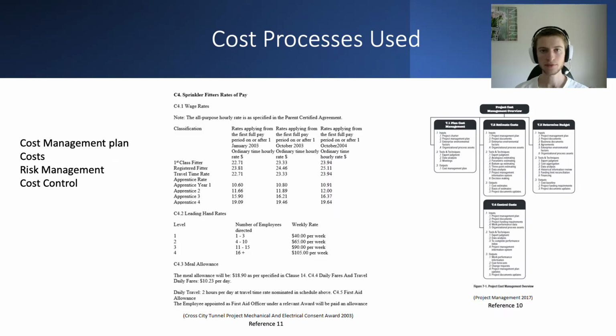The project had a cost management plan based on the work breakdown structure. This allowed direct costs, direct project overhead costs, and general administrative costs to be estimated. It was difficult to find the project's work breakdown structure, however, it is expected they used a bottom-up approach for each work package as the project progressed.